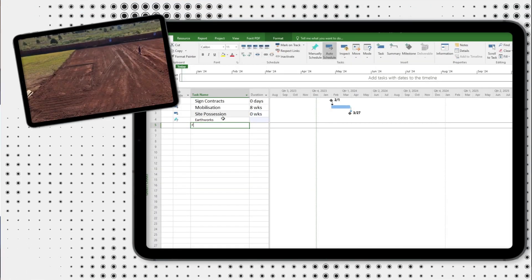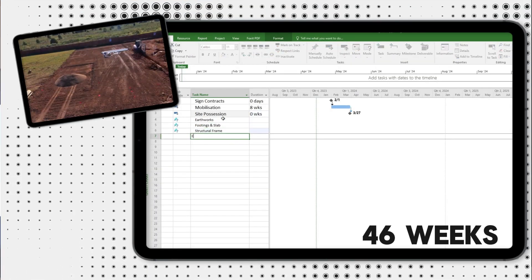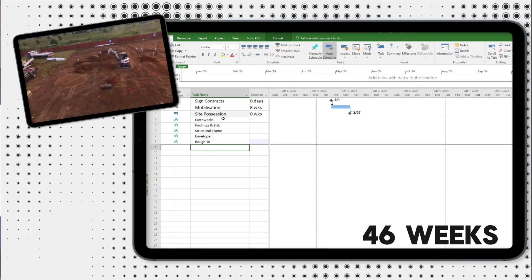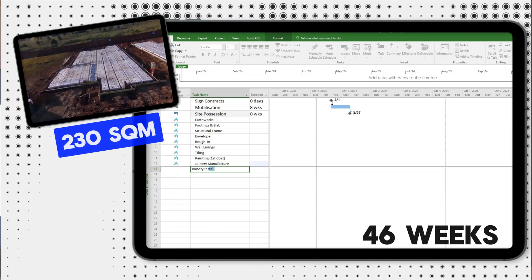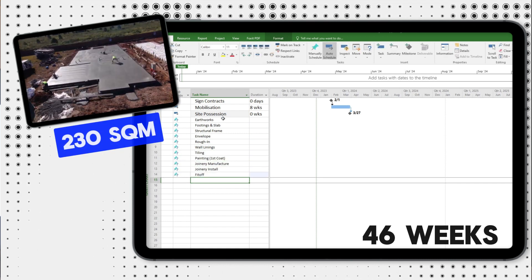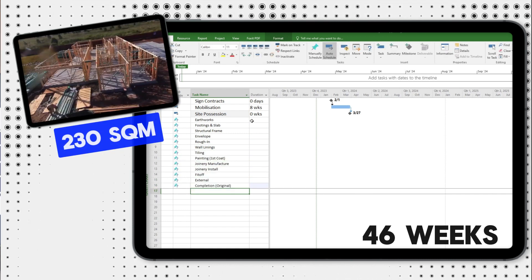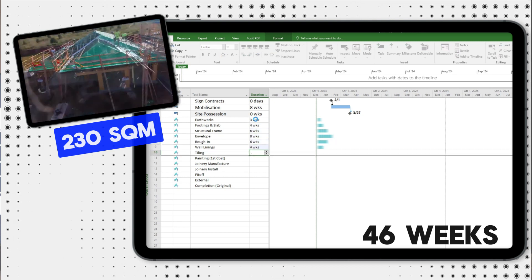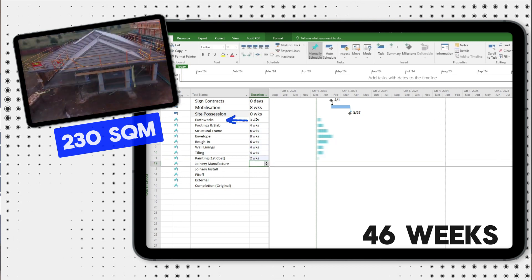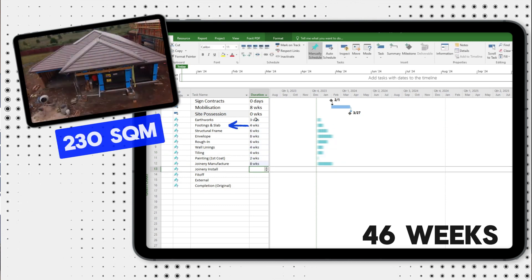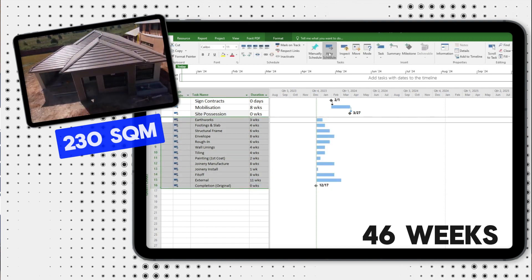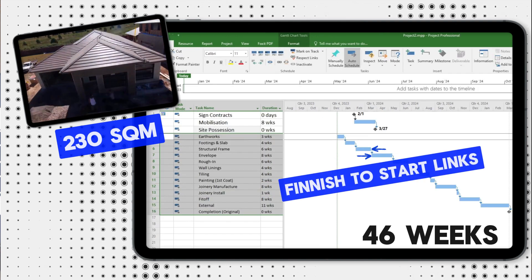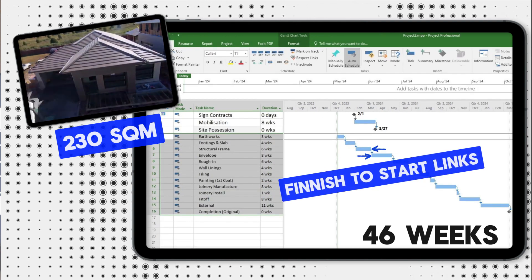For the purpose of this video I've prepared a simple program of 46 weeks, which is a realistic duration for an average size detached house of say 230 square meters with standard inclusions. I've scheduled major activities — earthworks, footings and slab, structural frame and so on — then applied simple finish-to-start links for all these activities.